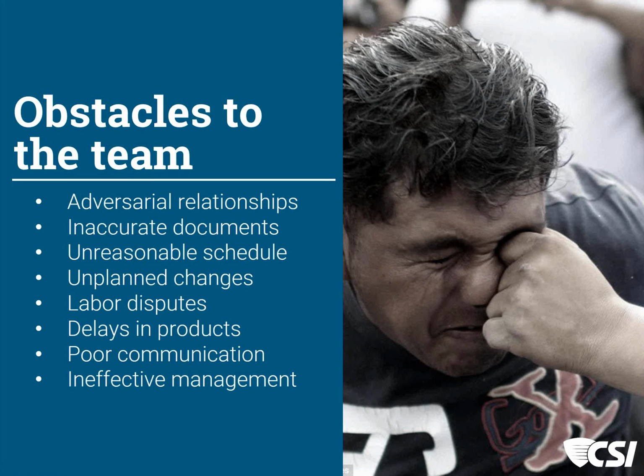Particularly those that work in public work, for schools where bond packages or fundraising has to happen, that also can affect the production schedule. Perhaps even create changes that weren't planned during the design phase and also during the construction phase. Where you've worked on projects for private clients, it may get acquired by another organization. And so there are a different set of rules that have to be implemented into the delivery of the project. Depending on where you are in the country, there can be labor disputes, whether you're in an area that uses union work or not.